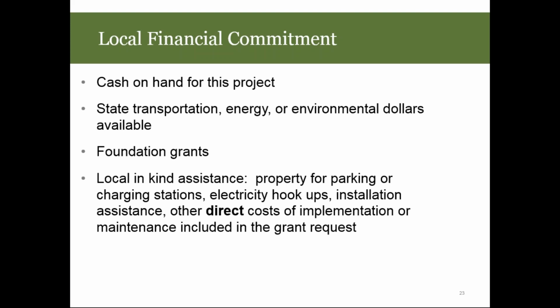They had vehicles that hadn't reached their useful life, so they traded those vehicles out into a route or system that was not going electric, so that they didn't have to sell the diesel vehicles they were replacing, but were able to replace the diesel vehicles in their system, not necessarily on that route, by basically just moving things around.